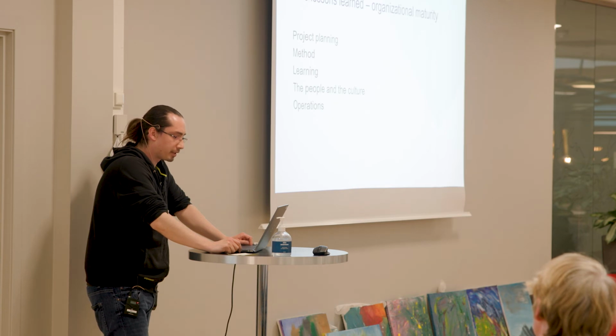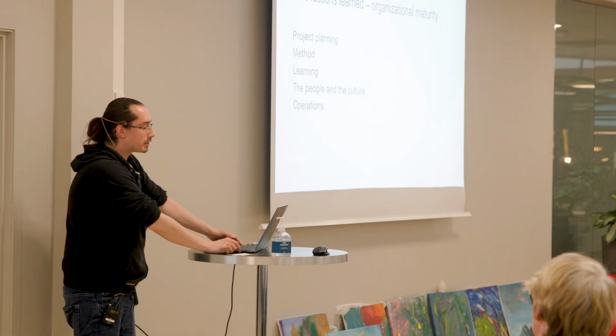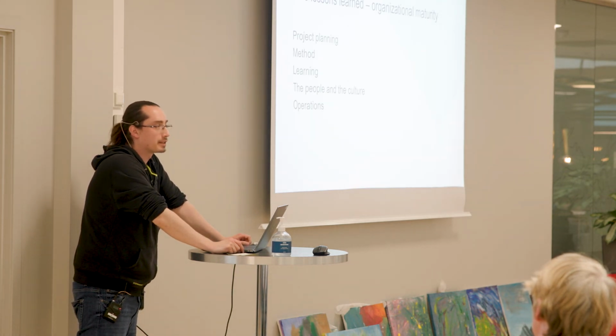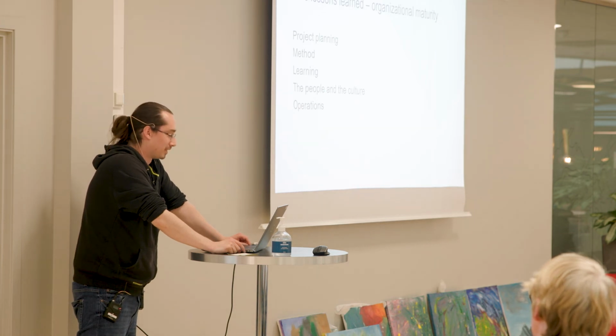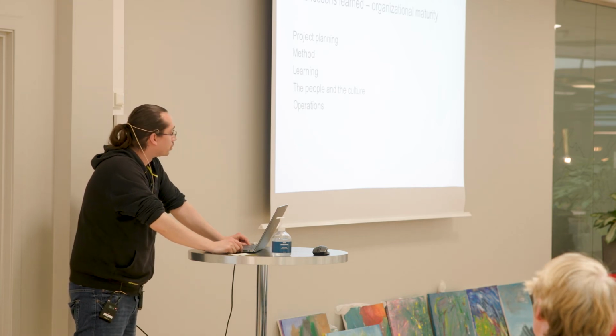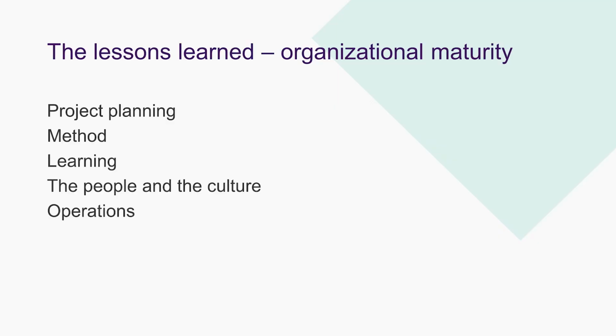In terms of project planning, the interesting thing about this project is that originally it was planned in something like 2018, which is a while ago, and it was not replanned. I guess some of you may know what that means. There was no inkling of the time required to develop infrastructure at all in any of the estimates. And that's a huge problem, obviously.